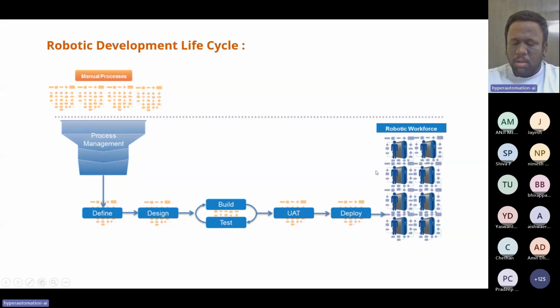After 3 to 4 weeks, or in between, if there are some new changes, that will be considered a change request, where again you will have a change management cycle, consider it as a new request, estimate it and do all the things. If everything works fine as expected and there are some small fixes, they will be assigned to the developer again. He or she will fix, test, and deploy in the hypercare. Once the 3 to 4 weeks time frame is completed, it's handed over to the production team, where they will be the L1 support, and we'll be there just to help them out by shadowing the things.